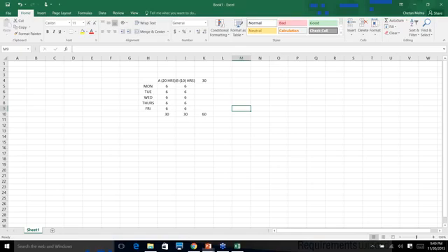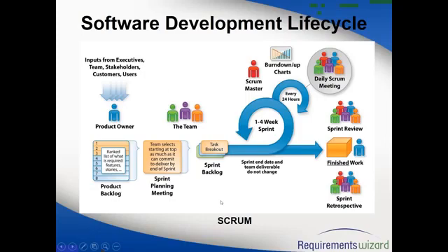Right? So whatever work you commit to as part of the sprint is known as your sprint backlog. So let's suppose we committed only one story. So one story is my sprint backlog. I may have 50 in my product backlog, but for that sprint, I'm only concerned with one story. In the real world, of course, you don't do just one story. You will have at least 4 or 5 stories. But in this example, I'm just telling you that the scope of that sprint will be only one story. Clear?